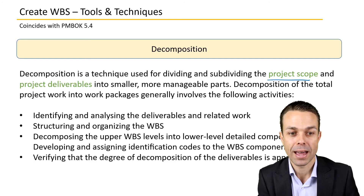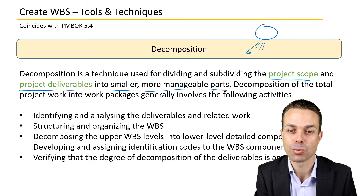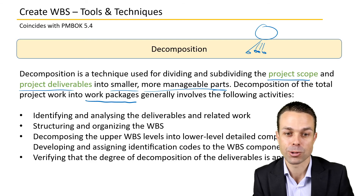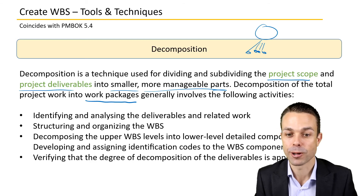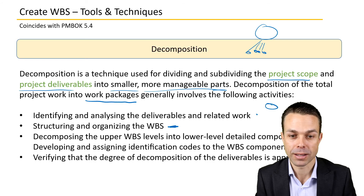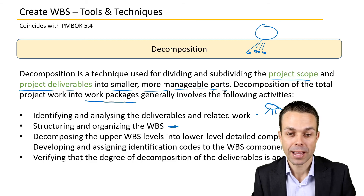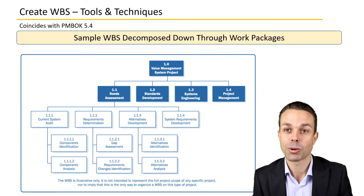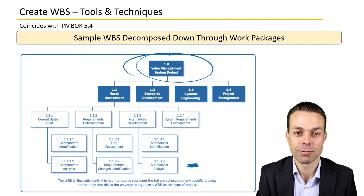Decomposition is a key tool and technique — dividing and subdividing the project scope and project deliverables into smaller, more manageable parts, no longer high-level but much more manageable smaller pieces. Decomposition of the total project work into work packages generally involves: identifying and analyzing the deliverables and related work, structuring and organizing the WBS itself, decomposing upper-level components into lower-level components, and verifying that the degree of decomposition is appropriate — have we broken it down enough that it can be assigned to someone to work on?